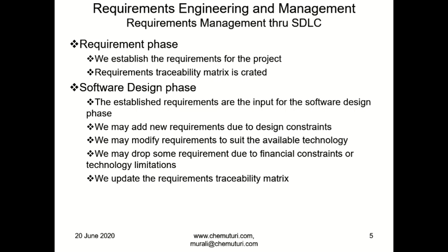And in software design, the established requirements are the input for the software design phase, and the output is the design artifacts. We may add new requirements due to design constraints. The design may throw up some new requirements, especially in the ancillary requirements, or it may postpone some requirements, or it may modify some requirements, and we may totally drop some requirements because there is a technology limitation or time limitation or funding limitation.